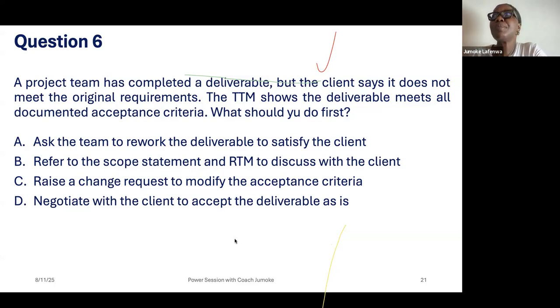People just feel, oh, that's adaptive, we'll just be doing everything anyhow. No, there are some restrictions. And for every iteration, you have a definition of done. Before you start the iteration, the customer, the product owner, and the team would agree that once you achieve these things, then we can say the iteration is completed. And it will be based on what is selected from the product backlog. You would have estimated the story points and what have you.